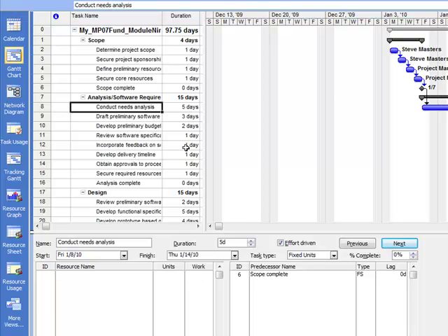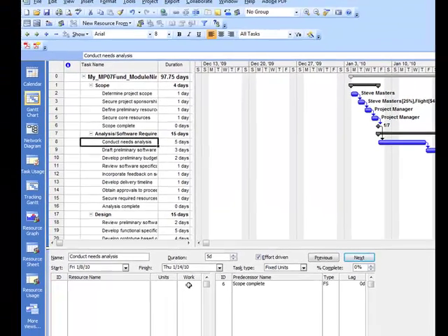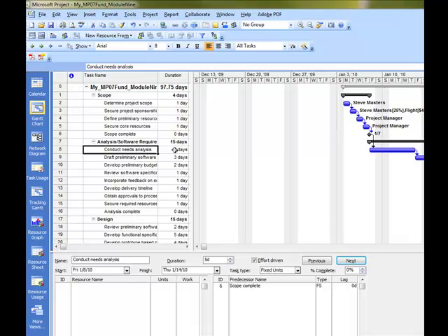So in this case, when we assign Kim Rawls to this task, it's taking the duration, which is 5 days, multiplied by the 100% of the resource to give us the total work. So if we assigned Kim Rawls at a lower percentage from the perspective of units, it would give us less work, but the duration would still stay at 5 days. Okay? And you always have that option, of course, right? You always have that option.